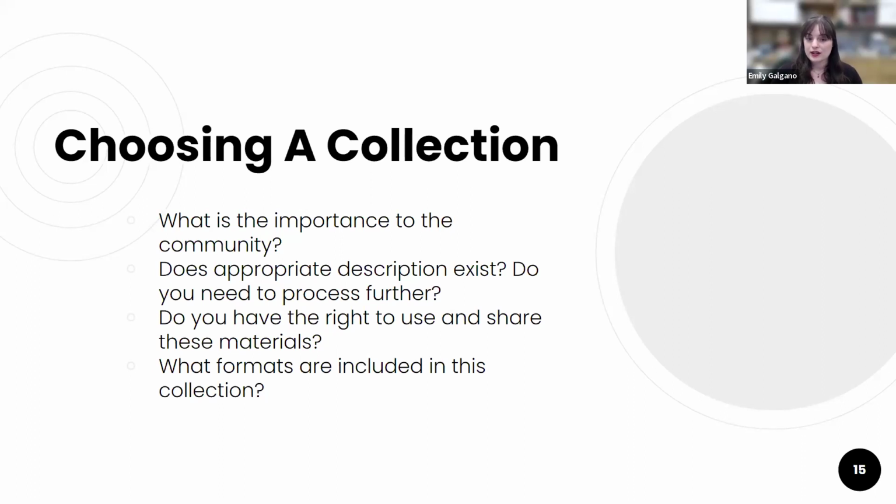On the other side, in our current Hidden Collections grant, we are working with a photograph collection that had no real description at all, aside from the fact that it was generally organized in chronological order by decade. This can still be an achievable project, though, because a good chunk of our digitization plan also involved working with elders and community members to help identify the people, places, and events photographed in these images. That can impact your timeline. Our Recordings at Risk grant was much shorter timeline than our Hidden Collections grant. So that's why it's important to know what sort of description you have. How much time do you actually need to allot to description in your project?